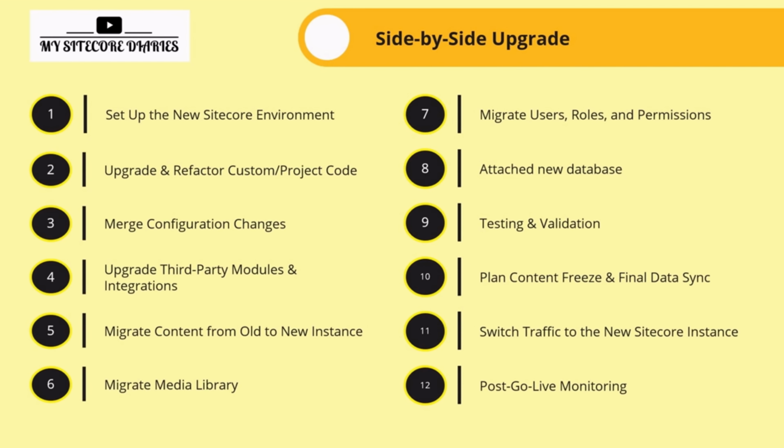After going live, you monitor it, check the logs, and if there is any issue, resolve it, and then decommission your old server. So this is the approach which I would prefer for a Sitecore migration. It's up to you which one you want to do.